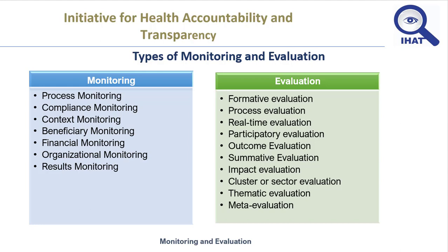Let's not also forget the important aspect of financial monitoring. The main purpose of financial monitoring is to measure financial efficiency within a project. It tracks the real expenditure involved in a project in comparison to the allocated budget and helps the project team to form strategies to maximize outputs with minimal inputs. This is often conducted in combination with process and compliance monitoring and is crucial for accountability and reporting purposes.